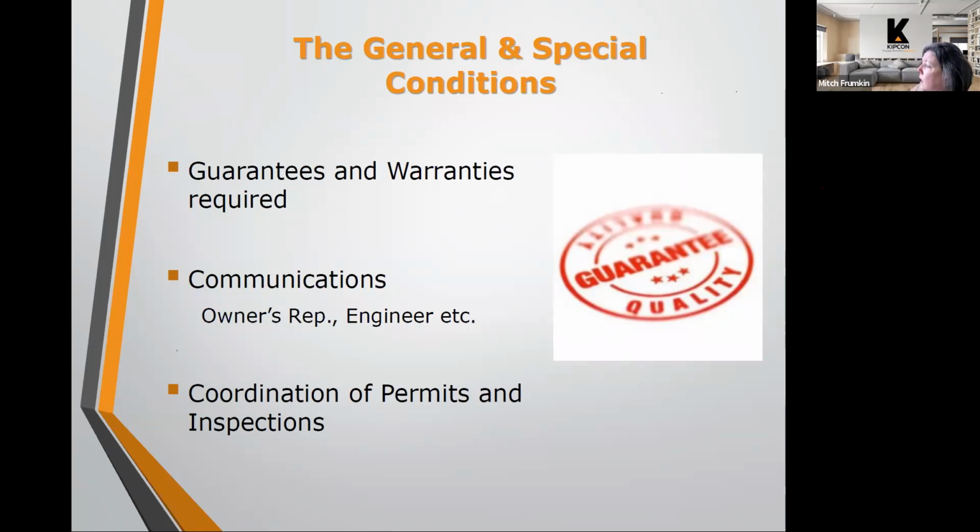I will tell you that when we do remediation projects with community associations, during contract administration, I always insist that all parties are copied on any communication, including the contractor, the owner, and Kipcon, so that nothing gets lost in translation, or there's a separate conversation, say between the engineer and the contractor, that doesn't get conveyed to the owner. It's very important to have good communication during a project.